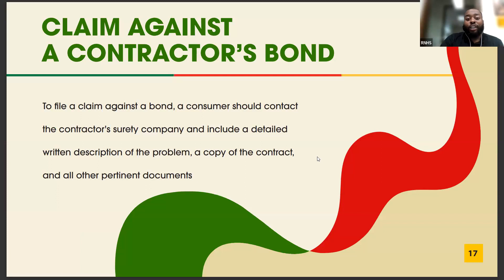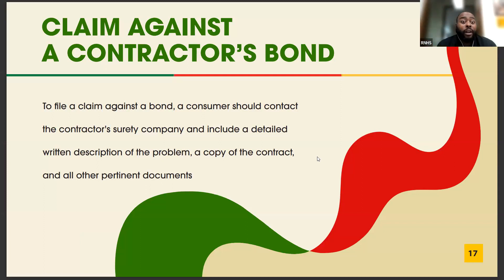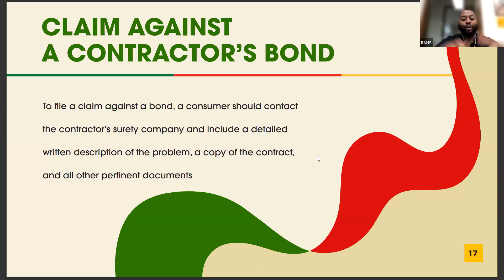All general contractors will have both a contractor's bond and insurance. If there's an arbitration issue or you go to court, money the contractor owes you often comes from their bond. Different cities have different bond amount requirements. The contractors we refer to you through the program will meet those bond and insurance requirements — and after tonight you'll receive a checklist of those requirements to verify yourself.